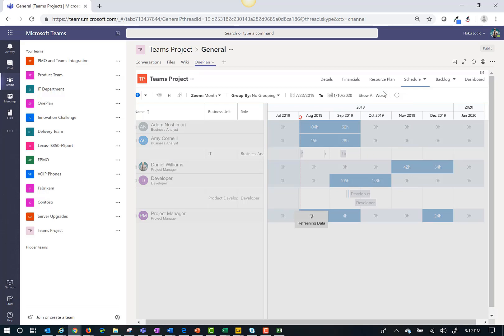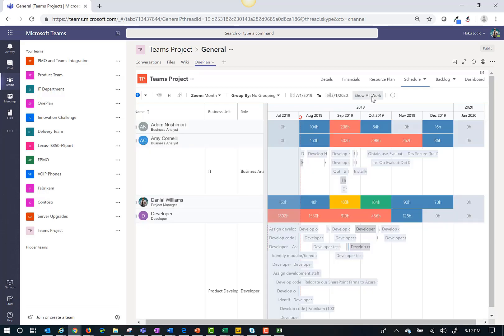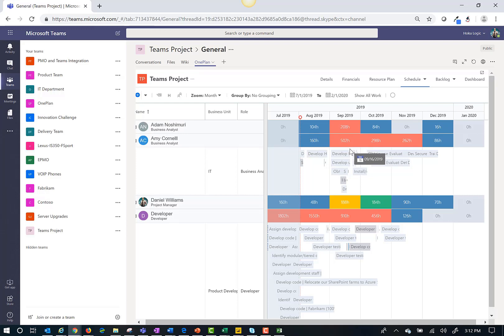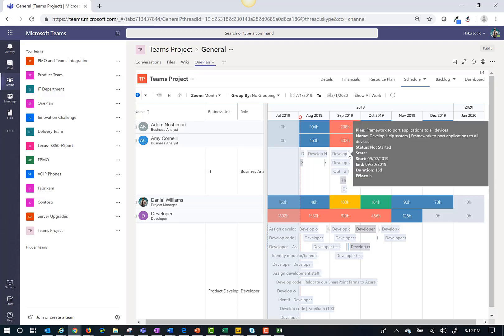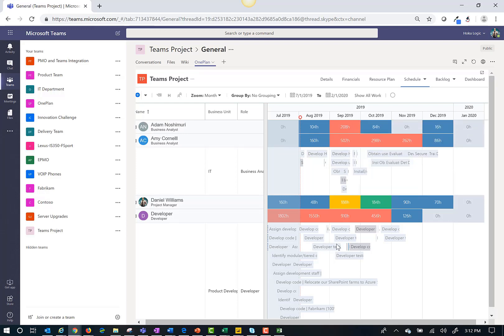But if I want to see the work from other projects as well to see where there may be over allocation, I click show all work and it will load in all work assigned across the projects to which I have access. Here I see that Amy and the developer are over allocated.